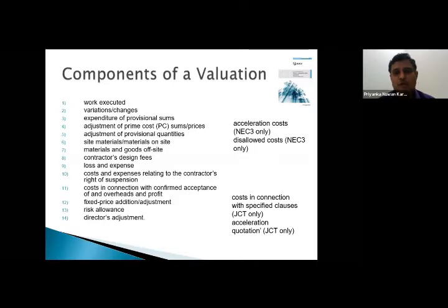But when you are talking about a project of a lengthy nature, if it is a 3-month project, if it is a 1-year project, or maybe something like a 5-year project, an interim payment needs to be made to the contractor to sustain. Otherwise, the contractor may not be able to pay the salaries of the staff, pay for the machinery that he has hired, or pay for the material that he is going to procure. Therefore, in order to facilitate this, an interim valuation is of utmost importance.